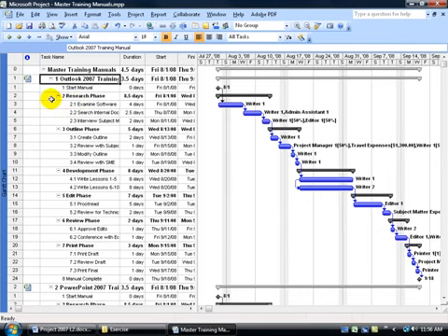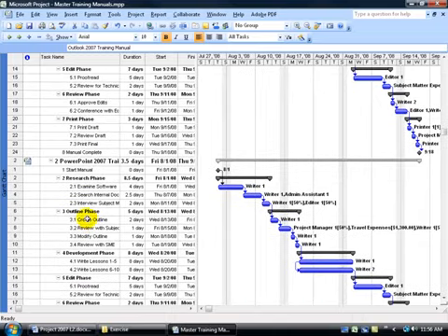So project 1-2, project 1-2.1, project 1-2.2, and then when I came down here, project 2-2, project 2-2.1, and so on. So I could tell whenever I'm looking up here or below here or in my reports what project I'm in, and not just by the actual title of the project.